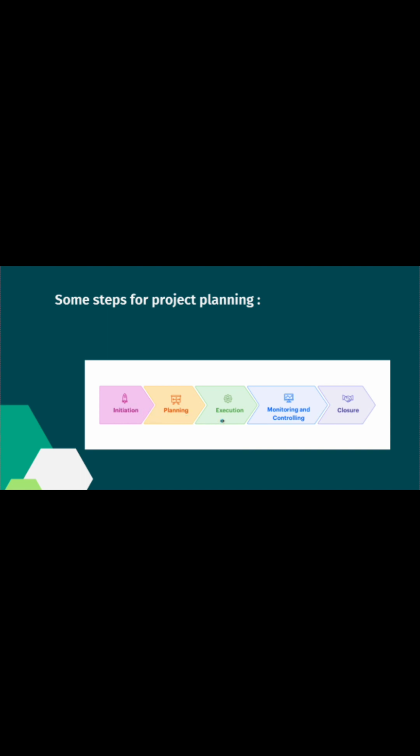The project execution stage is where your team does the actual work. As a project manager, your job is to establish an efficient workflow and carefully monitor the progress of your team. The fourth is monitoring and controlling. In the project management process, the third and the fourth phase are not sequential in nature. The project monitoring and controlling phase runs simultaneously with the project execution, thereby ensuring that objectives and project deliverables are met.